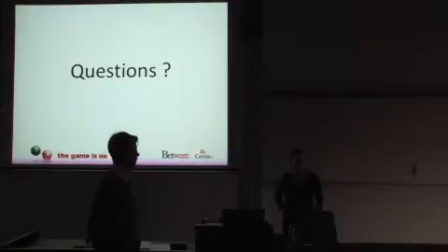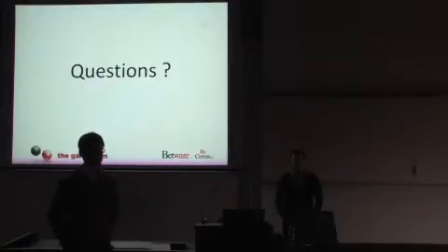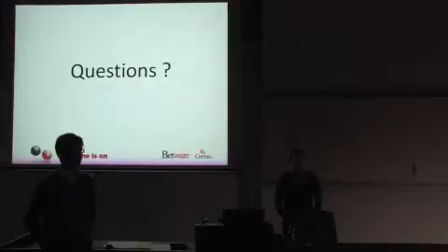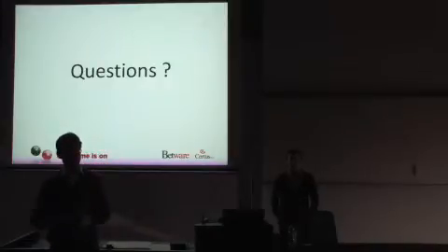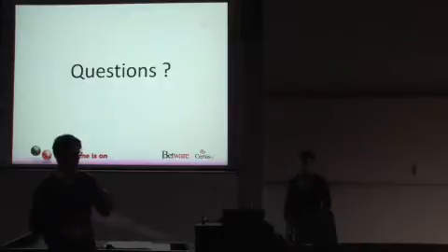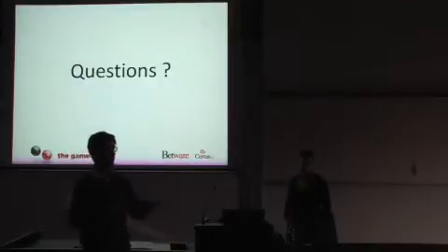Yeah, great. I was curious what length are your iterations, and what is the size of your teams? The teams are around 5 to 7, 8 people, but there are actually cases where we have run teams of up to 10 people. We assess each project, the case at hand, and take it from there. The other question you asked was the length of the iteration.